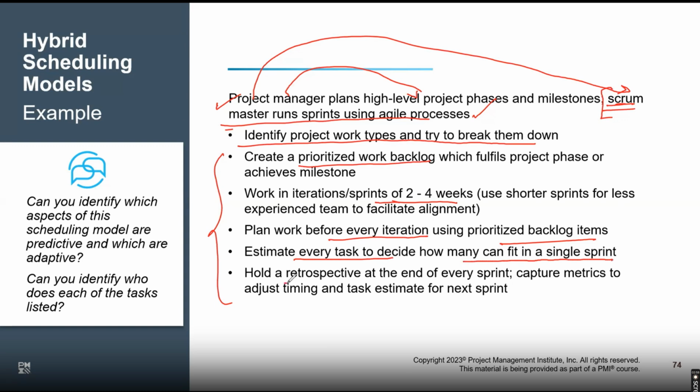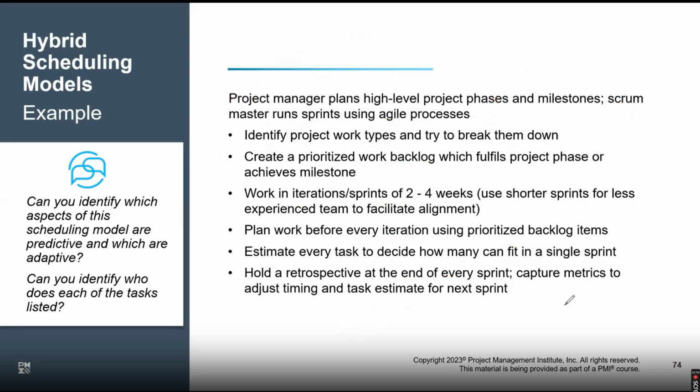After this job is done, you have a retrospective at the end of each sprint, and you capture the timings. Basically, we discuss the velocity. Are we maintaining the right pace or not? Accordingly, we will be able to adjust the following sprints. So we get to know, are we doing enough user stories per sprint or do we have to increase our velocity. Same stuff, there's nothing different in here. Same elements that we already covered yesterday.